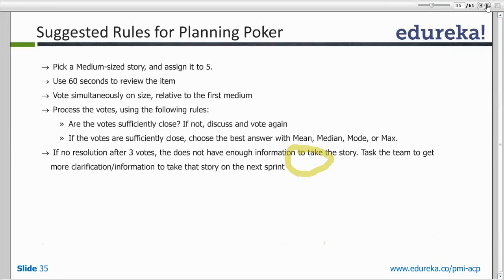The team will discuss and then vote. If we were in the common room, I would read the requirement, you guys would think about it, and once I say 'show,' you would show your card. For example, if you felt a story is a 5, you would show the card of 5.